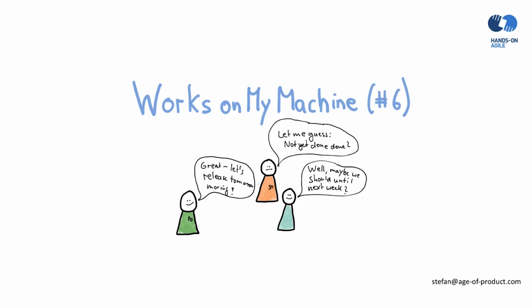This is really at the core of Scrum. Whatever you define as done needs to be done by the standard. Otherwise, you create havoc and it's really breaking apart. So do not show anything that is not meeting the definition of done criteria. But that's a simple one. If this is happening, it's a good topic for a retrospective.